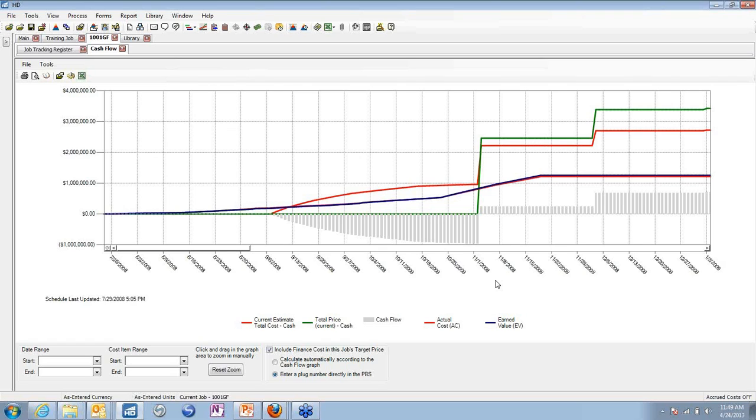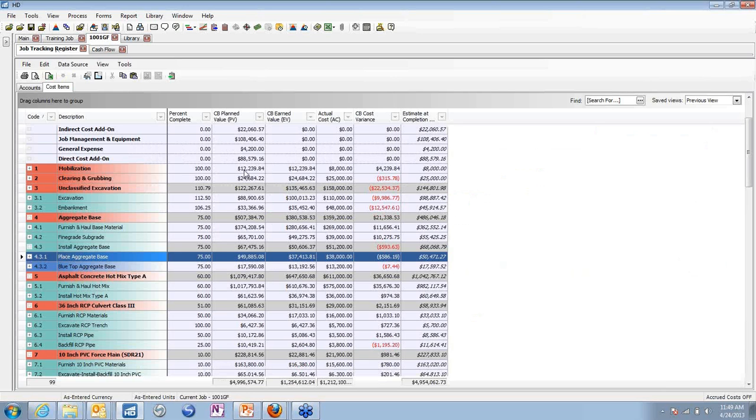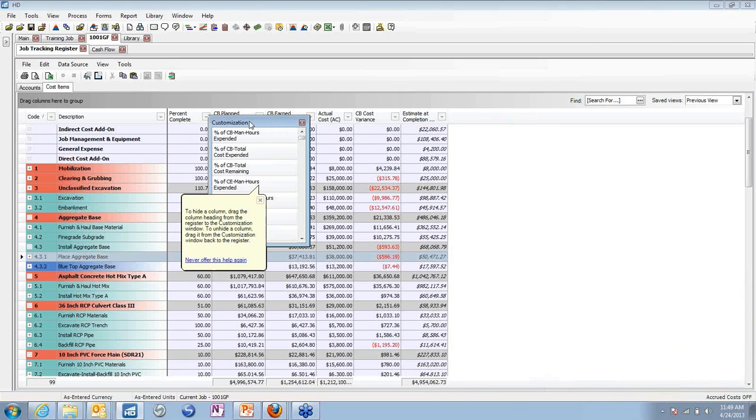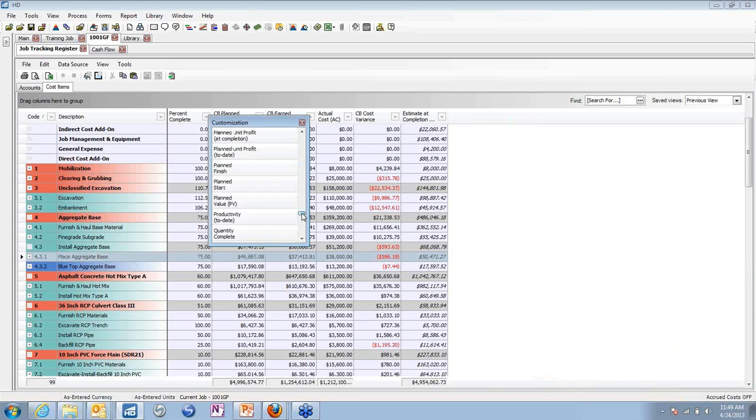First question we have is, can Hard Dollar facilitate risk baselining? Risk baselining, yes. So, in a sense, Hard Dollar isn't a full risk management kind of tool. We're more focused on your cost and productivity and those changes. However, we do have the ability to track at the item level. You can use tagging to keep track of your risk. So, for example, I'll just pull up two tags that I have prepared here. One is risk level, and then risk description.